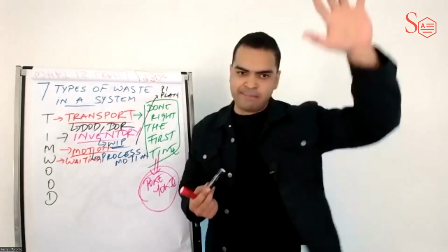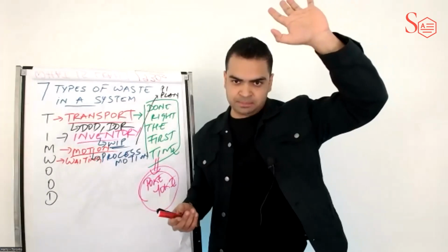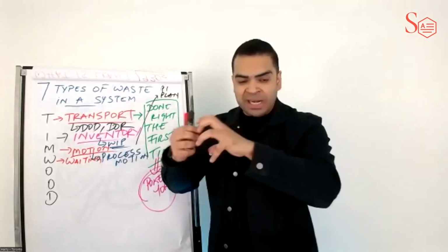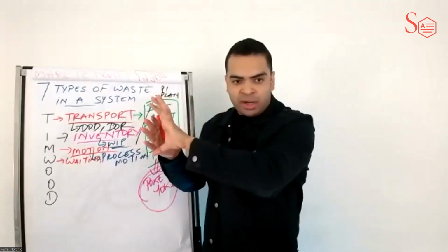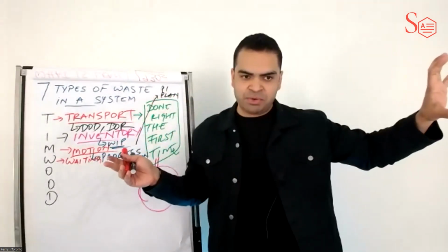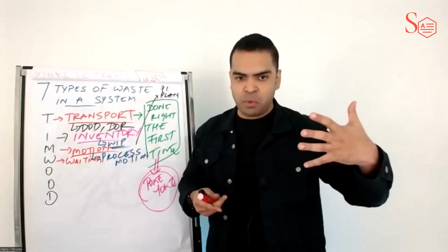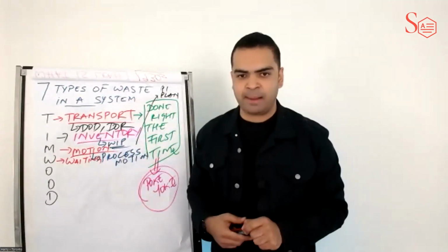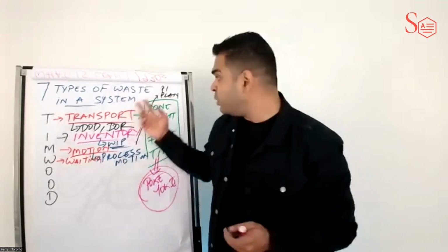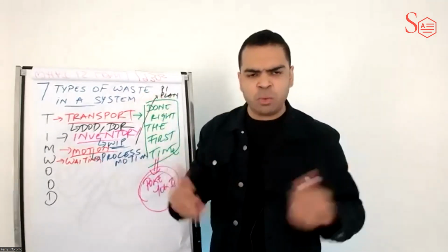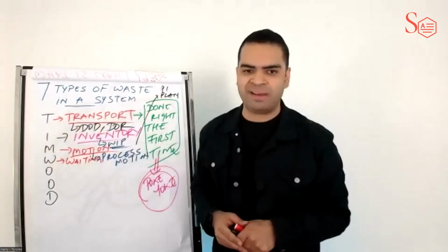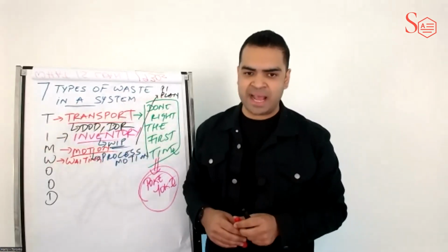Who's attended PI planning in real life? PI planning, yeah, what is PI planning? It is an event where multiple teams that are working on the same value stream get in the same room to build an aligned vision for their upcoming work. How often do we have things like PI planning? Generally, once every 3 months or once every 10 weeks or 8 weeks. So 8 to 12 is common for scaled agile organizations.